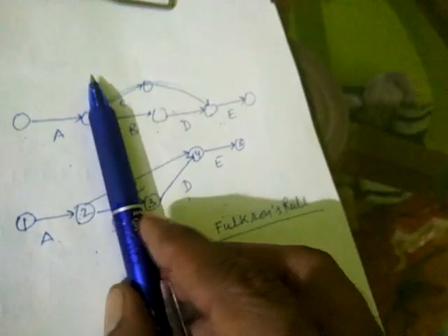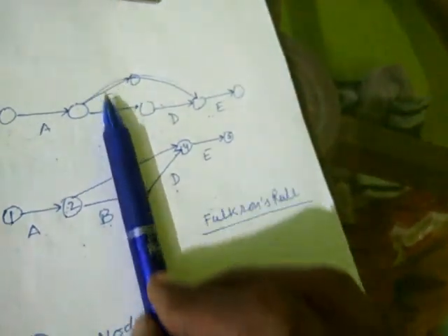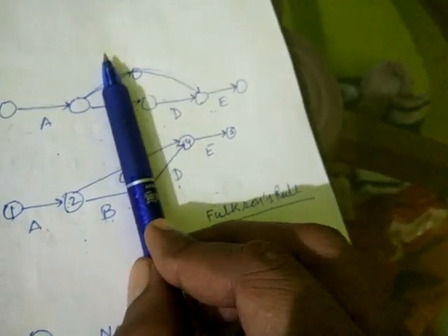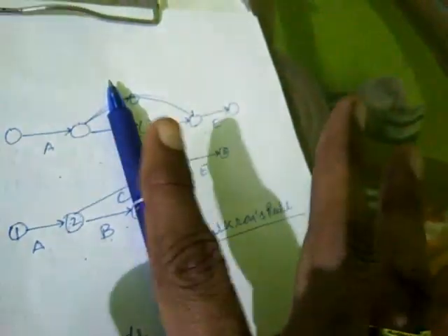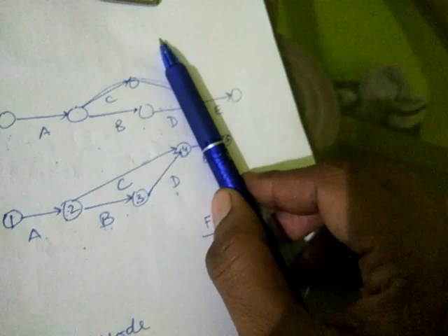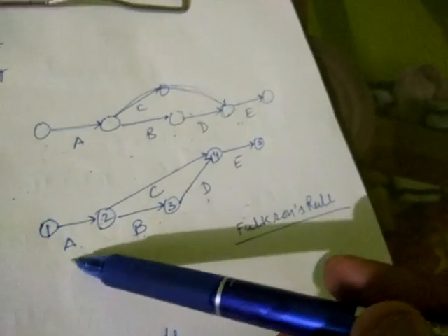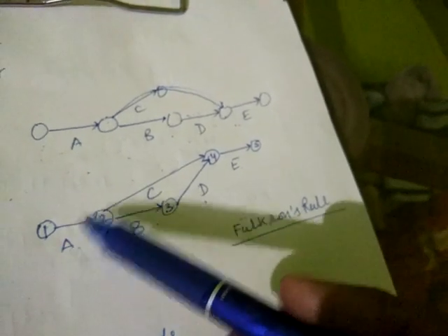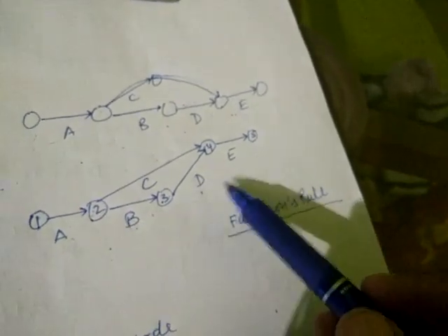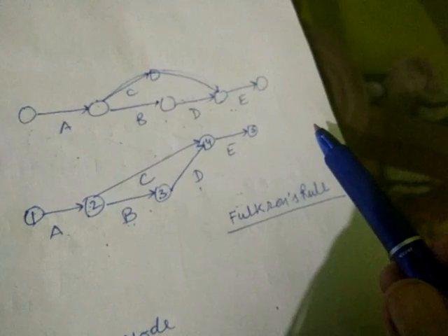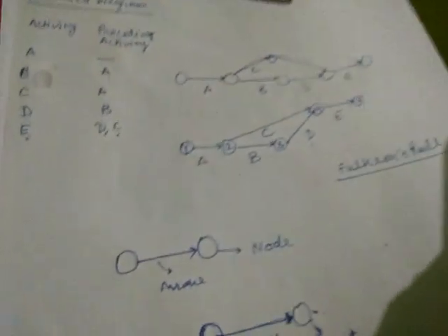This is very simple. If you take any cross section at any time, all the events lying before it should be numbered first, and then we should move ahead. This is a very simple rule. This is my experience: there is no such difficulty in writing numbers on the events. So I think this is the thing you have understood till now.